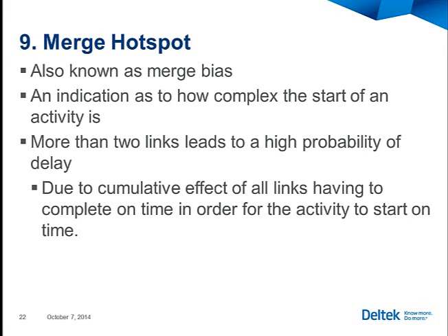It also can be a situation where your schedule doesn't have the risk baked into it to show that any one of those 100 predecessors is going to slip. So I can't tell you just by defining this metric whether or not your task is going to start on time, but I can tell you, A, you might be using way too much logic to make your schedule robust, which is going to make it actually less robust. Or if those 100 predecessors are real, you better plan on many of them slipping and actually finishing the project later than you anticipate. So that's why we call these a hotspot. We need it to be looked at. We need it to be reviewed for accuracy and for risk.